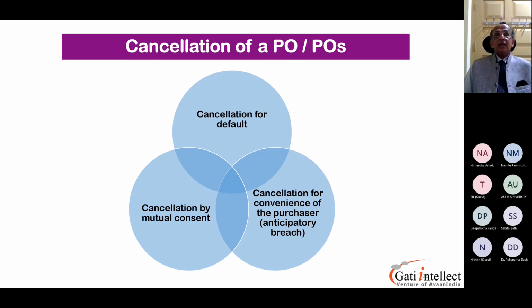See, normally, let me give this example and then I'll come back to you. The manufacturing of the Boeing 787 was considered the world's largest buyer-seller collaboration contract, in which 85% is being outsourced to various countries internationally. 35% comes from Japan. Now the point I was trying to say was, this particular contract faced several issues in the beginning itself, because the raw material in which they were making these aircraft was not available.